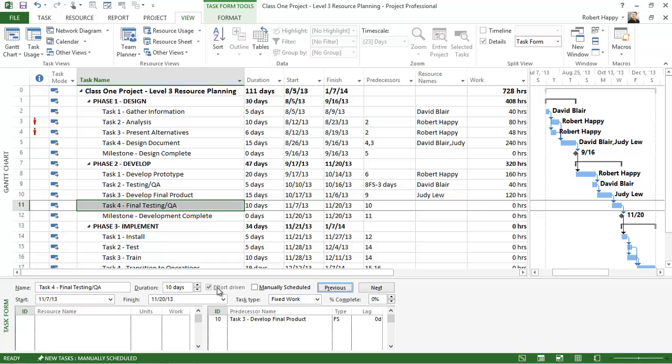So effort driven is fixed work, and what that means is that you're estimating the effort and that's going to fix the work. Regardless of what you do to your resource assignments, the work will stay intact and most likely duration will get recalculated.